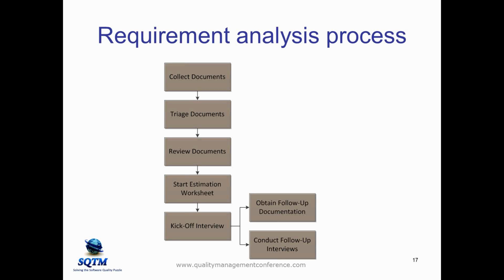As an overview of the requirements analysis process, we collect together documents about the project, we triage the documents to identify those that are useful from an estimation perspective and sort out those that are not useful. We review the useful documents in detail. We create an estimation worksheet of some kind. We normally do a kickoff interview at that point, and during the kickoff interview, we want to ask the business users to explain why they are doing this, what they want to do. We ask questions about it. Then based on that interview, we obtain follow-up documentation and conduct follow-up interviews.